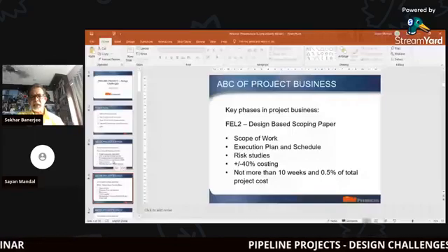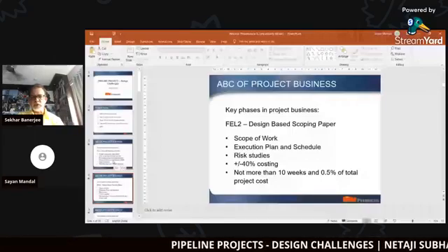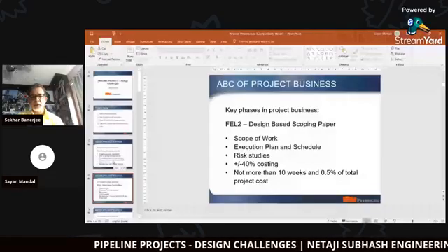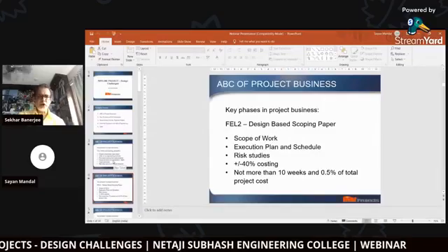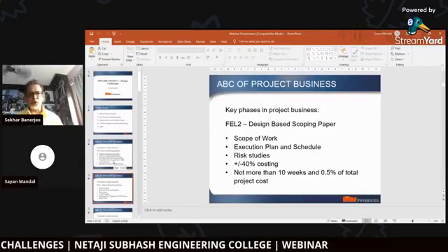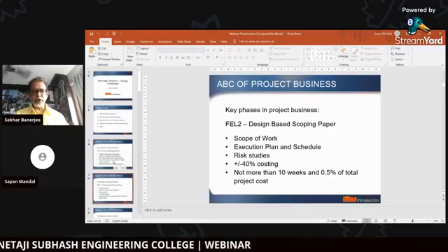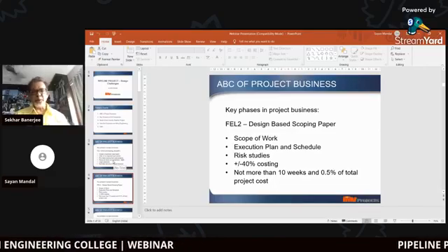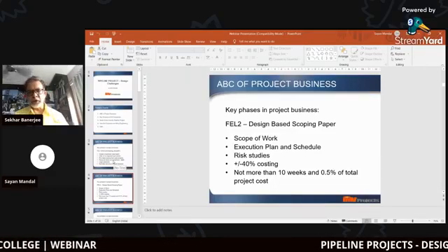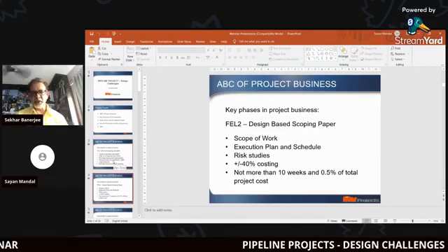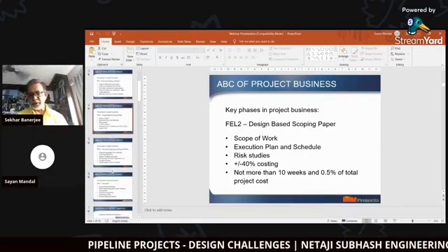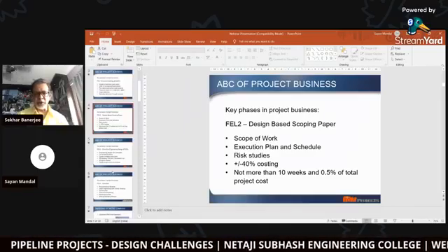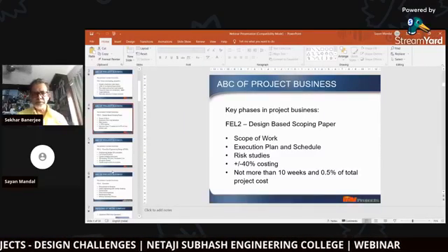Here they have very experienced consultants, people who have actually done the job many times. The main task here is creating a document describing a general scope of work with a reasonable cost estimate, and this report, which we probably make in 2.5 to 3 months, goes to the decision maker again. But this time, it is for the budget allotment.